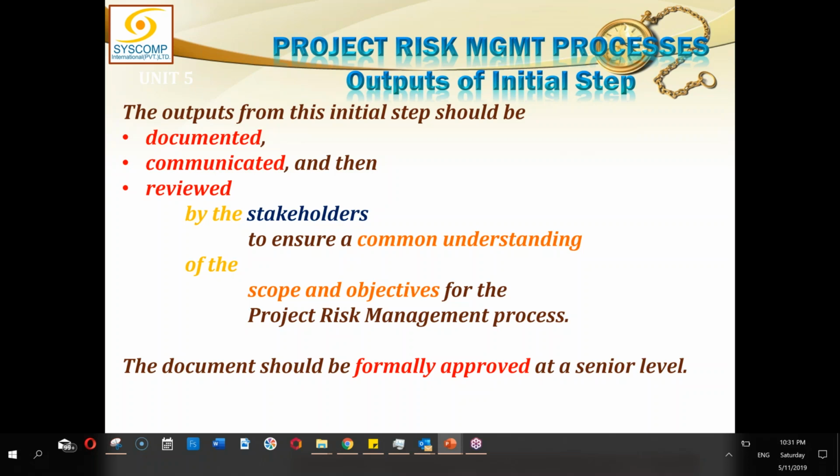You see, we are keeping all the stakeholders abreast. First of all, we ask them, what do you want? What is your tolerance? I have determined the attitude of the stakeholders about risk. I have determined their thresholds for various objectives of the project. And then I have documented all of this in a risk management plan, and then I have shown it to all the stakeholders so that we and they are on the same page, and they approve that document and they agree with us. They are on board with us.